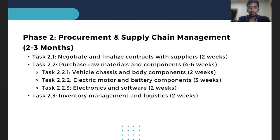The second phase is procurement and supply chain management, which takes around two to three months. This involves securing contracts with suppliers, purchasing all necessary raw materials and components, and ensuring efficient inventory management and logistics.